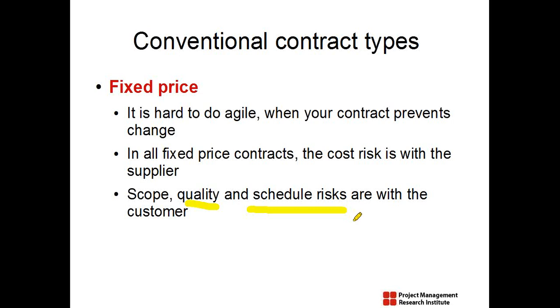So this fixed price waterfall kind of model will not really help you to go agile, because agile promotes frequent deliveries, and it promotes partnering with the customer, and it promotes accepting changes even very late in the development cycle. So fixed price may not work for us.